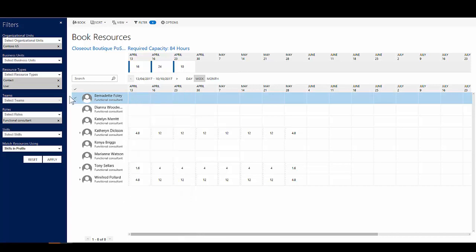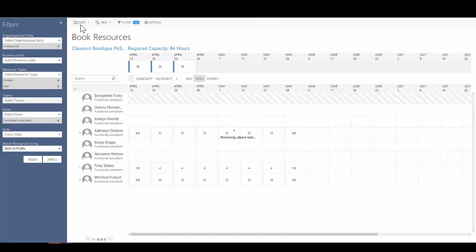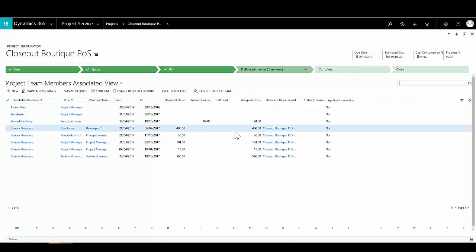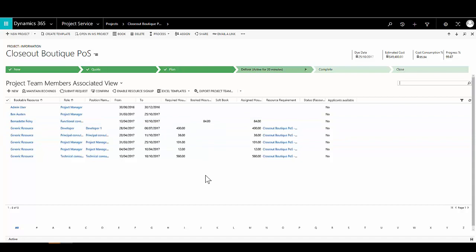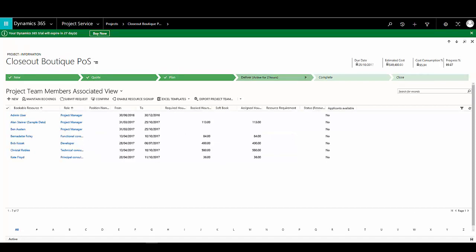In this case, Bernadette has availability, so we'll select her as a resource and click the book button. CRM will complete the booking and provide a notification. We're taken back to the project team members view where, instead of a generic resource for our functional consultant requirement, we can see Bernadette booked for the full required hours. For the remaining resources, we can either continue making hard bookings for specific individuals, or use the Submit Request button to submit a resourcing request to our central resourcing team, who will find the appropriate person and make the booking on our behalf.